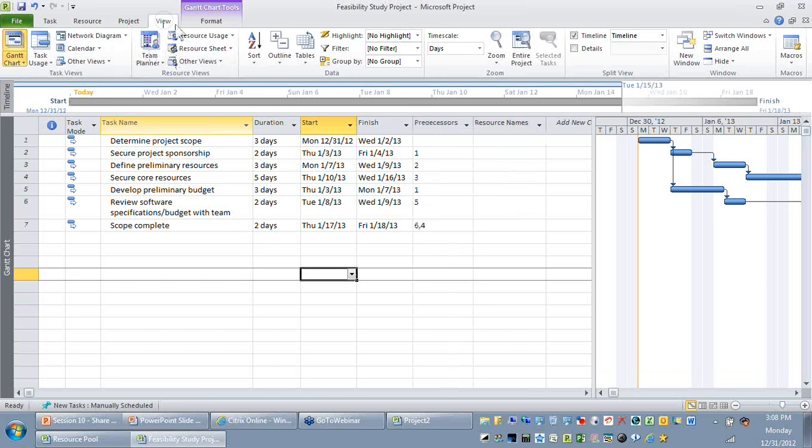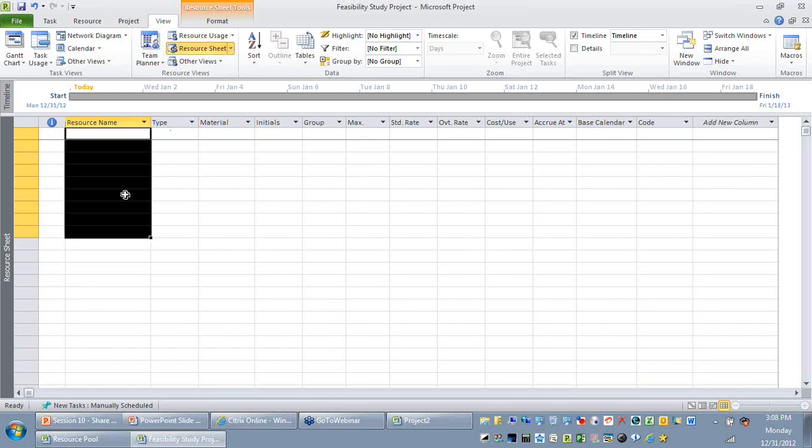The challenge when you have resource information local to a current file is that you might have to duplicate the same information across multiple files. The second challenge is, in case a resource is overloaded with work, it is quite difficult to find it because the data is duplicated across multiple files. So I'm not going to add my resource information here.